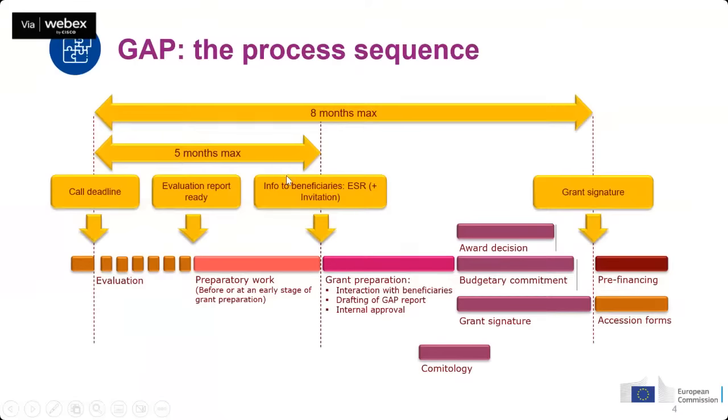I have to give you some information here because I saw a question in the slide. This time to grant of 8 months applies to all of Horizon Europe except the ERC. The projects in the ERC have a much longer time to grant that goes from 14 months in the starting grants to 16 months in the synergy and consolidator grants. The proof of concept grants have a shorter time to grant, which is about 7 months. Petros already gave you some information.